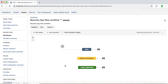When a story transitions from Open to Work In Progress, that explains how the story moved from one status to another. For example, the BA would have worked on the story, after sprint planning the project manager would have picked it and assigned it to a developer, and then the developer would transition it from Open to Work In Progress when they started working on it. That is the transition happening from one status to another — that's the second key component.